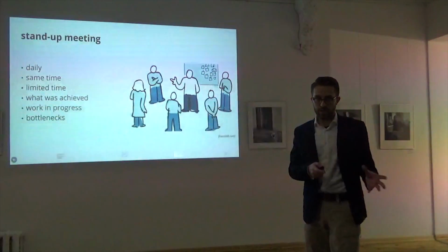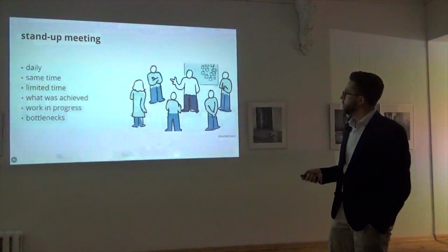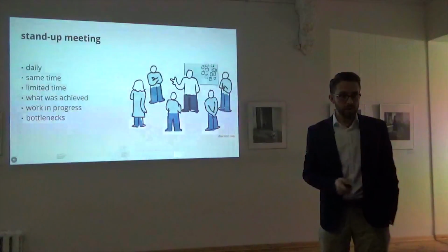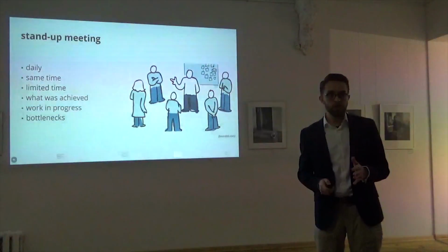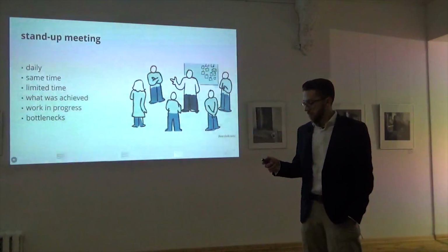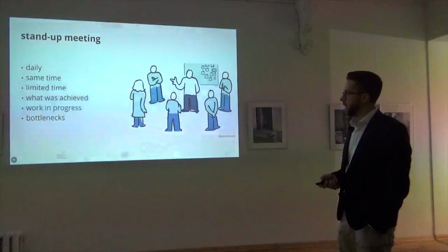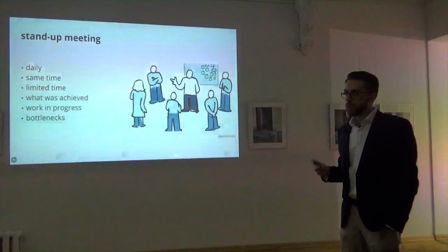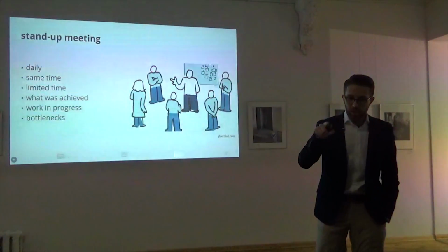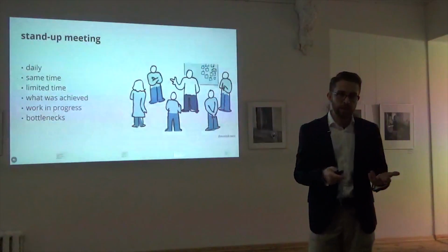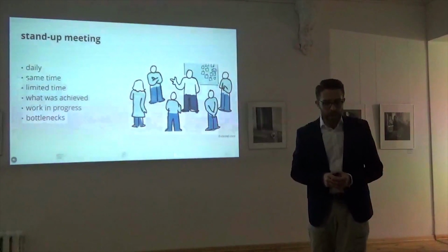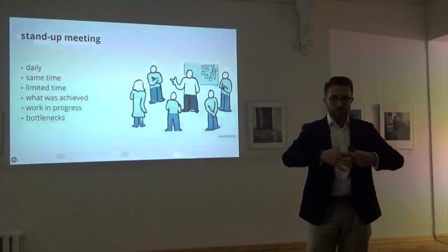There are some rules. This is what we talk about on a daily basis. What was achieved yesterday? What is the work in progress? What am I working on today? And where are the bottlenecks? And that's every morning. Usually the bottlenecks define the work in progress, and that's a very, very simple concept. And you manage it. I talk with the husband of my sister, who is an IT developer. He has like 15 people in his team, if I'm not mistaken. And he said usually it takes 20 minutes in this size of a team.